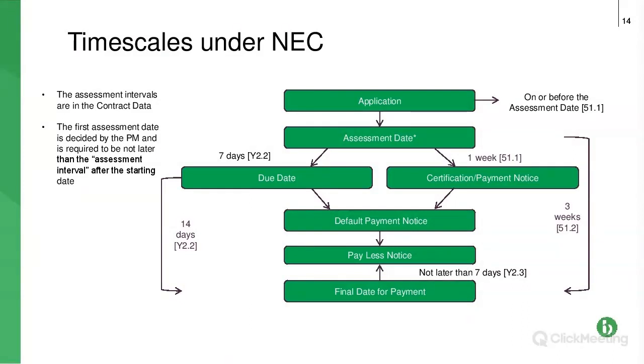On the other side, we've got the payment notice. Coincidentally, the payment notice is due 1 week from the assessment date. So again, that's going to be the 26th of the month. So that's the date the paying party has to submit its payment notice.